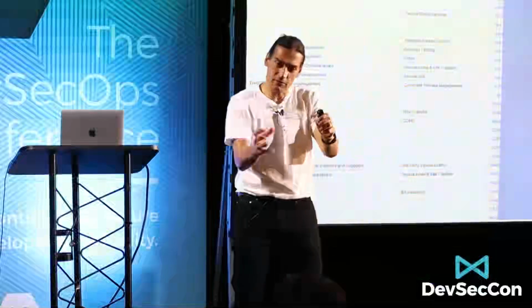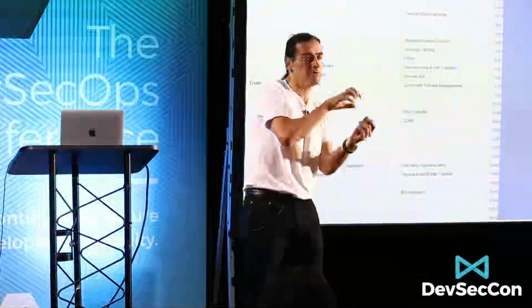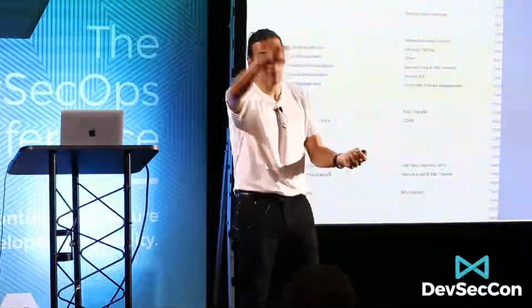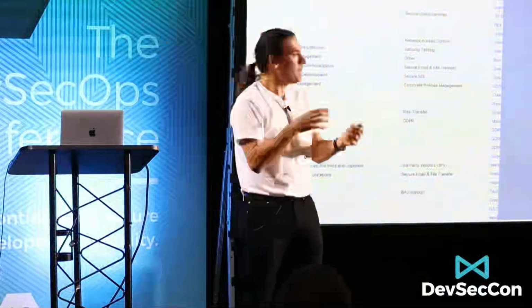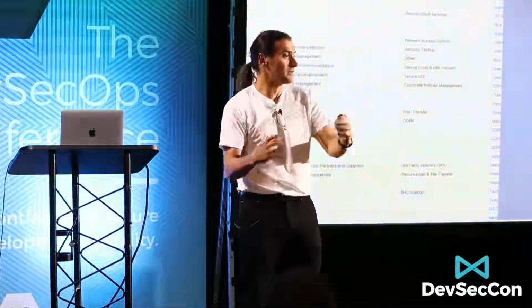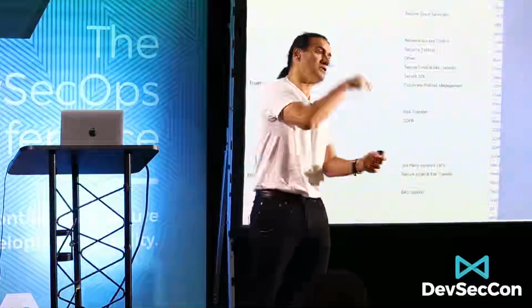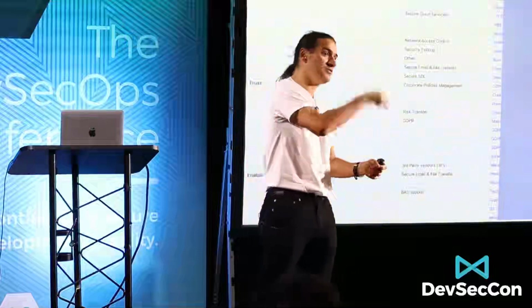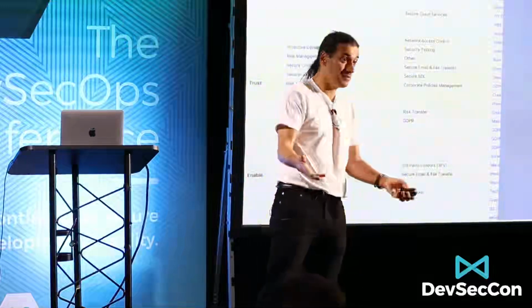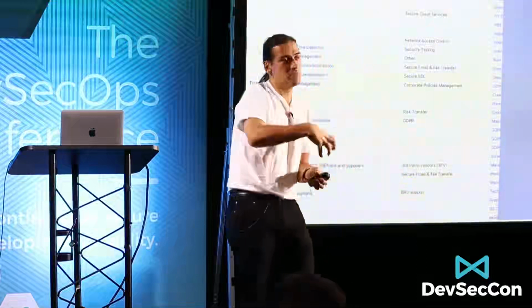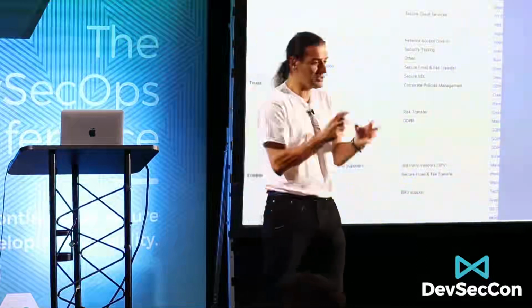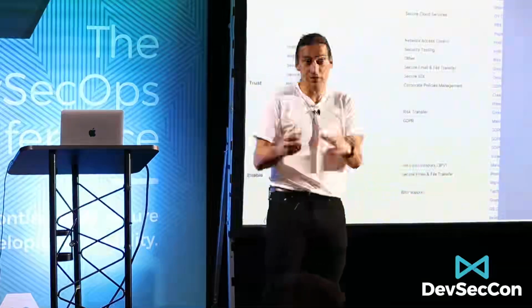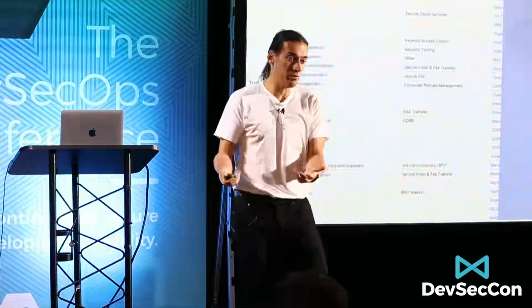See, so this is how the thing works. You get a vulnerability that we found. We map the risks. The risks now map to a project. It maps to a program, maps to a capability, maps to a pillar, right? But you then see the whole thing connected. The reason why you do a project is because the project fixes risks. That's why you fund the project. It's that simple. And then when a new risk comes along, the question is, do we have a project to slot this into, or is it not even on our roadmap, which is a much more worrying problem.